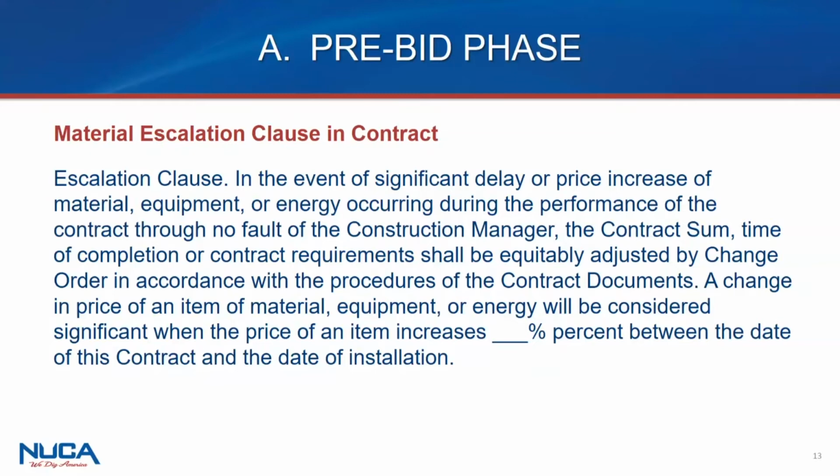So that might be a starting ground for everybody to understand that we can have these increases. But this is the kind of thing that you want to have in your contract. But just because you have it in your contract, it doesn't end there. Just because you have a material escalation clause in your contract doesn't mean that, okay, I automatically get it. You still have to make sure that all the other contract requirements are followed.